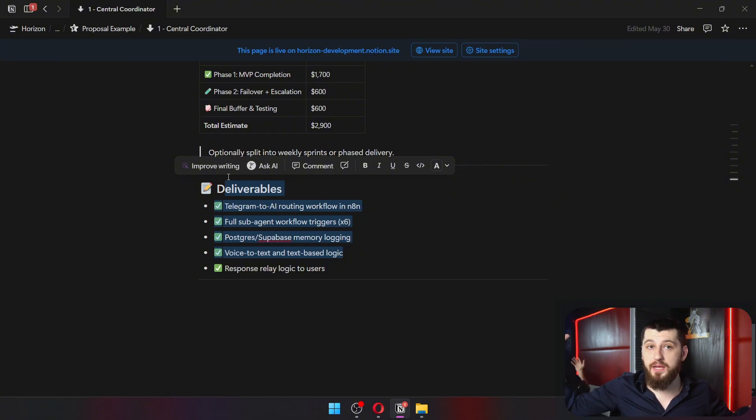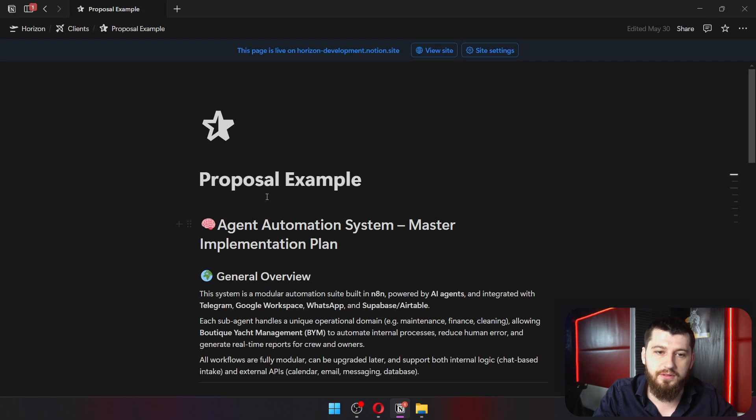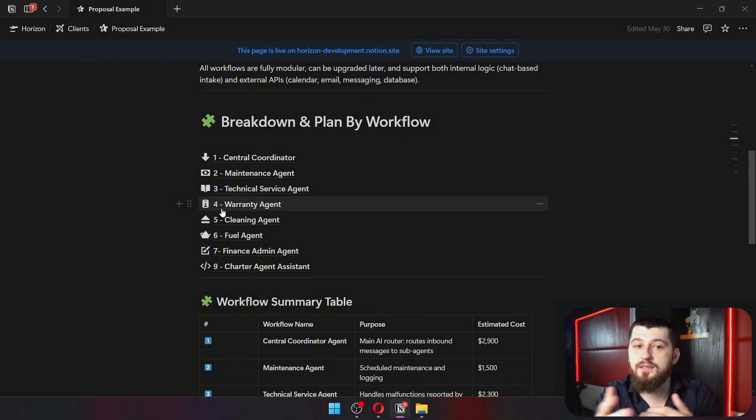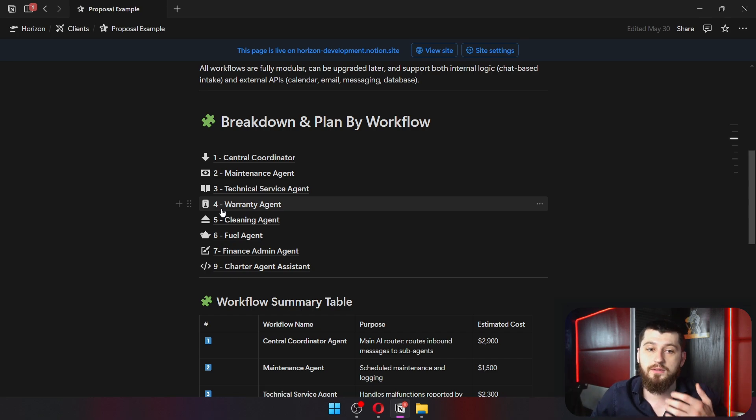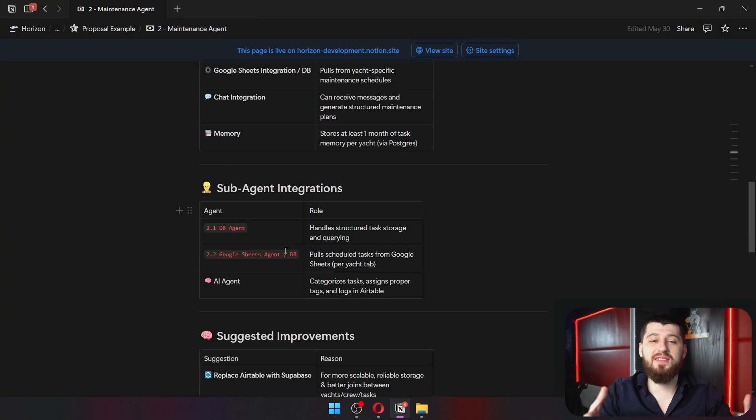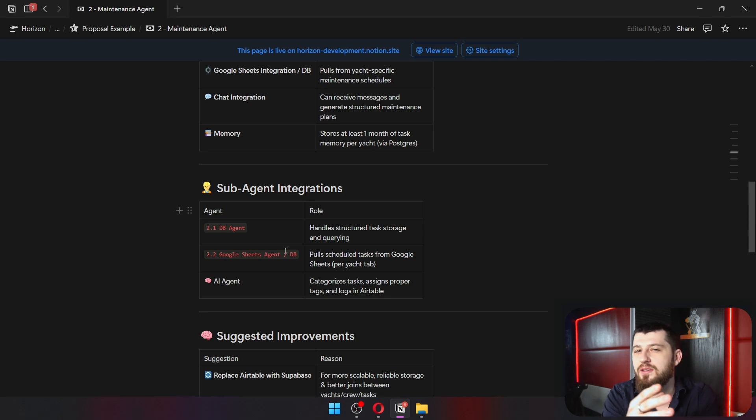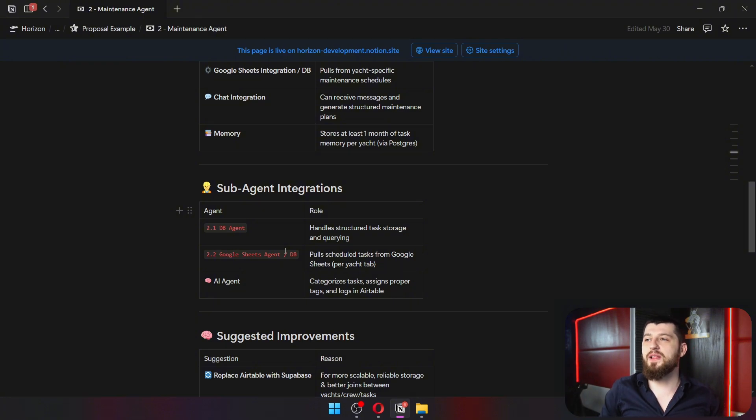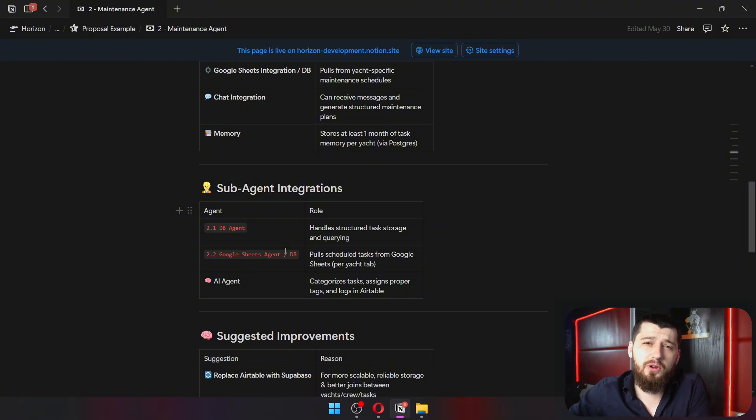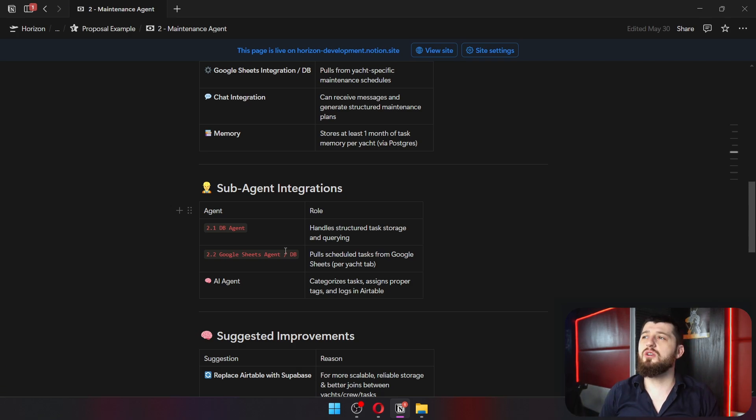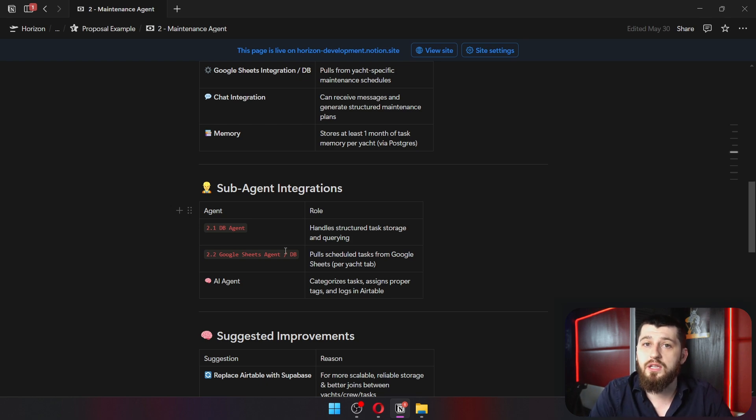Now these are for very big projects, so there's going to be multiple milestones. You don't want to plan too far ahead and especially with projects that are $50,000 plus, sometimes you'll only plan out the first three or four milestones really well and then the rest of the milestones you'll just give general ballparks. As you can see each of these milestones essentially have the same things involved with them and this can change based on your company. There's no real format to it. It's just a plan of these are the tech we're going to use, here's how long we think it's going to take, sometimes we'll even include these are the people that we're going to put in place. Just a good well-documented project plan that you might give to a project manager.